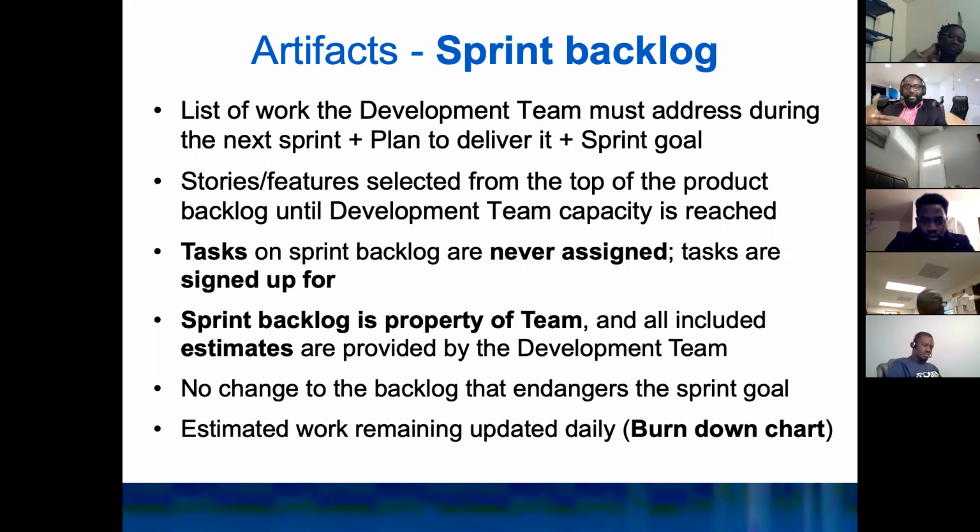I was telling you yesterday that that's a tricky question. So they're asking you, what's the sprint backlog? It's not only the product backlog items that need to be completed during the sprint. In addition to that is the plan to deliver it, meaning what tasks do we need to undertake on the product backlog items that were selected for the sprint? Who is going to do what? Some people are even estimating, putting hours on tasks. How long is it going to take?